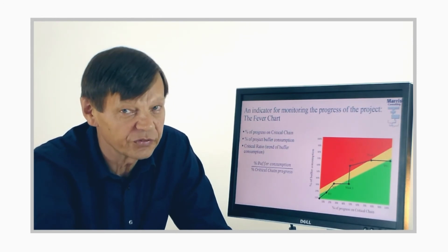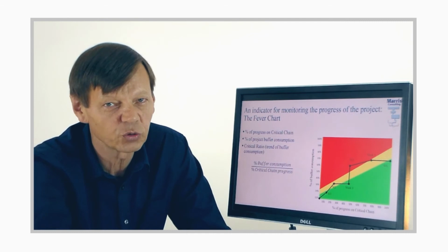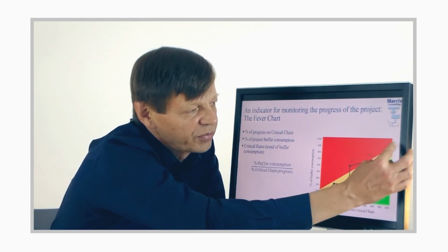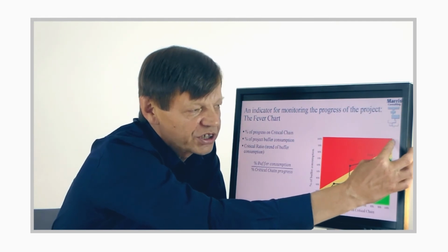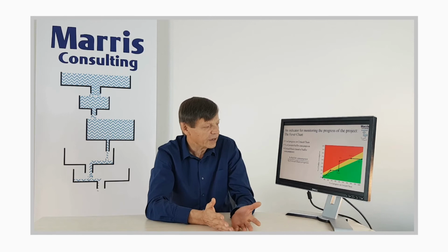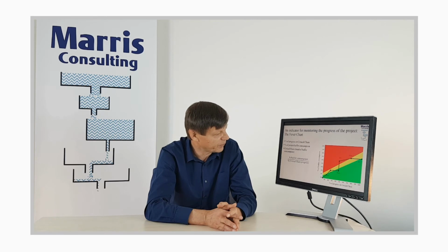And so if you want to finish all your projects on time in an uncertain environment, you better aim to finish all your projects early. Okay? And so when systems are properly tuned in critical chain, you should be finishing around here most of the time, right? So that is how you monitor the progress of a single project using critical chain.